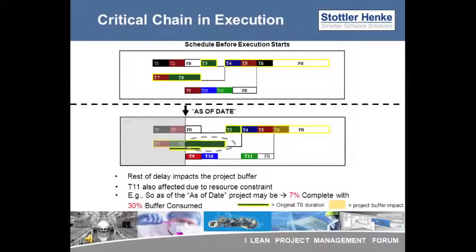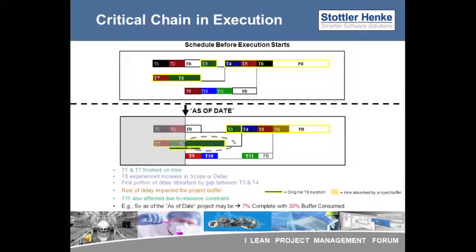Let us review: T1 and T7 finished on time. T8's duration was longer than its planned aggressive duration. The first portion of T8's delay was absorbed by the gap between T3 and T4, and the rest of the delay impacted the project buffer. T11 was also affected due to the resource constraint. Current project status: 7% complete with 30% buffer consumed. Note that many complicated interactions can be occurring, but the project manager just needs to monitor buffer impacts, which is much simpler.